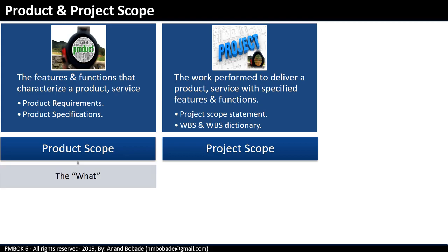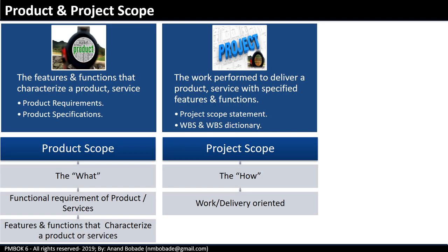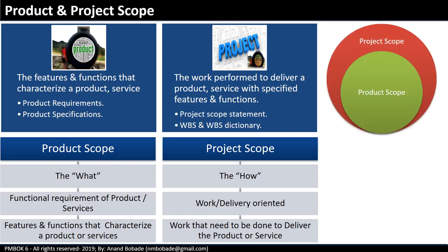Product scope addresses the question 'what' — what the customer wants. It refers to the functional requirements of a product or service, meaning the features and functions that characterize it. Project scope addresses the question 'how' — how the work will be delivered. It is delivery-oriented and helps you as a PM to identify and document the activities or work that need to be done to deliver the product. Remember, product scope is a part of project scope.